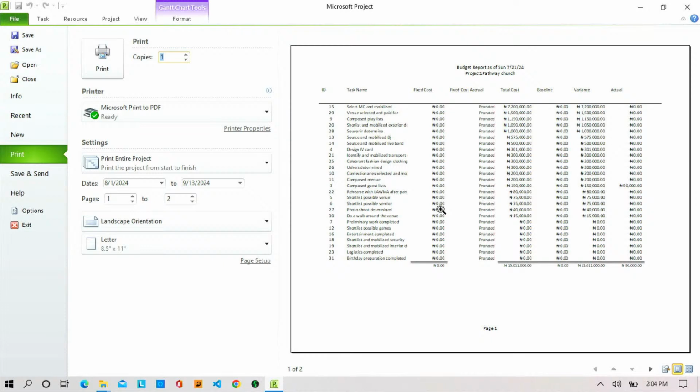But if the change does not affect your schedule, leave it. If you affect the cost, you change. You baseline both the schedule and the cost. Is that okay? Anything that alters the original baseline, you resave it as a new baseline. Is it clear, please?